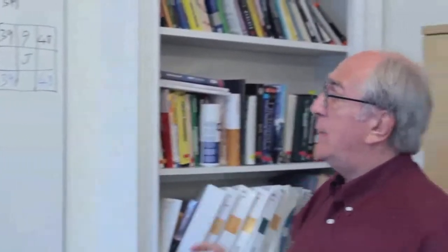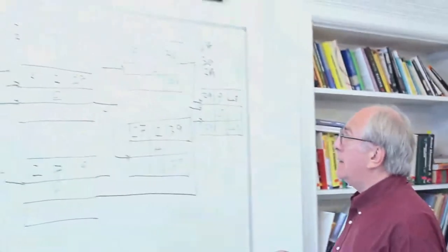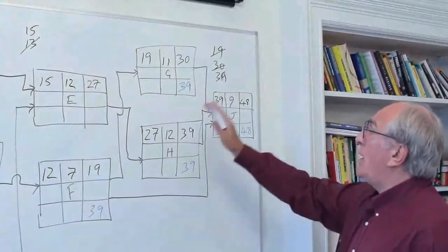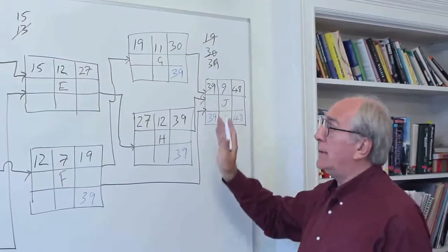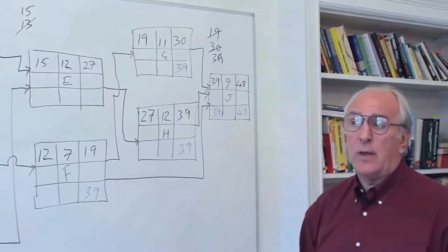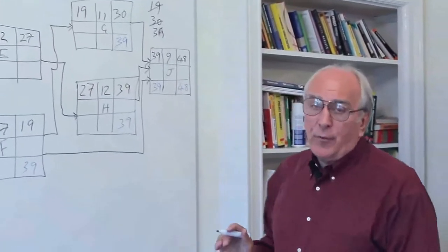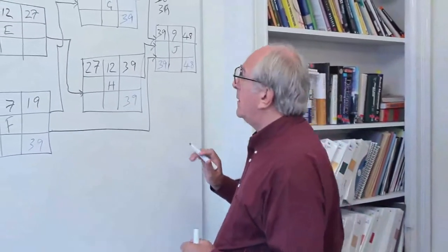We look at activity G and say, well, what's the latest time we can start G without affecting the end date of the project? And that's a key assumption. We're now looking at the latest start and latest finishes of these activities to do that without affecting the end time of the project. That's where we're at.